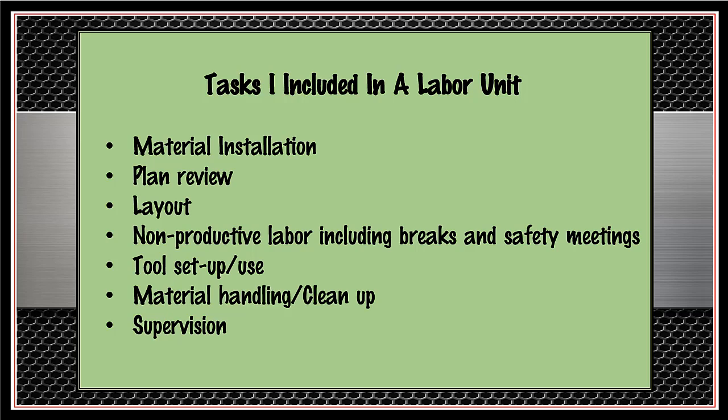On large projects, I would assign a dedicated material handler and have them receive, organize, deliver, and manage the material, as well as handle cleanup. This keeps high-paid journeymen from wandering the site looking for material and keeps them right where we need them, installing material.